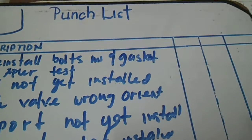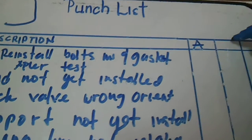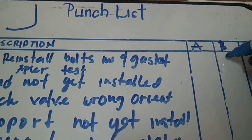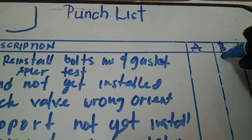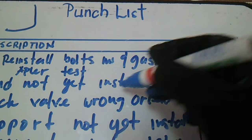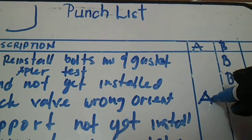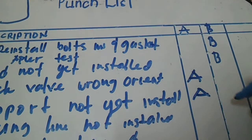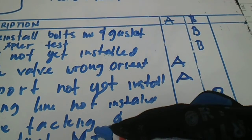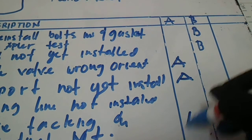Now we assign a category to each item. Reinstall bolts, nuts, and gasket — this is category B. Blind flanges not installed — category B also. Check valve wrong orientation — this is category A. Welded type support — category A. Tracing line — category B. Remove tucking from the pipe and conduct flush/empty — category A.